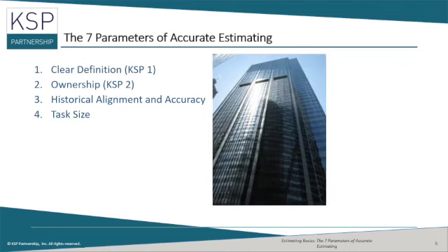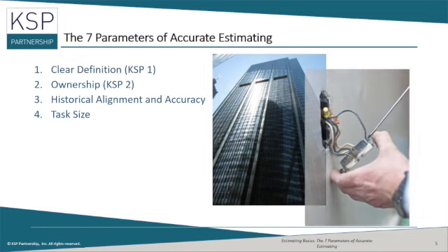Task size is our next parameter. Simply put, the smaller the task, the easier it is to estimate. To demonstrate this concept, let's take an extreme perspective. I may not know the cost of constructing a huge building, but electrical contractors know exactly what it takes to